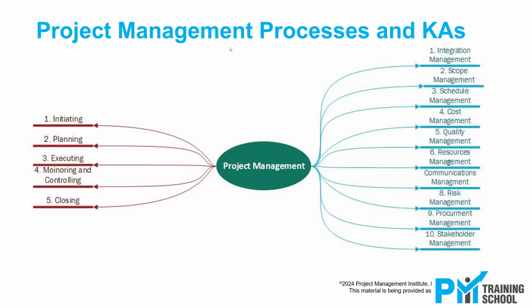So practically, this is not a life cycle at all. Initiation, planning, execution, monitoring and control, and closing is not a life cycle. It is basically just a grouping of certain processes. That's about all. These names should not and cannot relate to your phases. Again, you would have to name your phases or your stages according to the technical need of your project. You should not have some standard 6 phases or 5 phases.